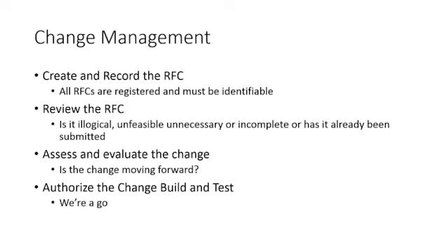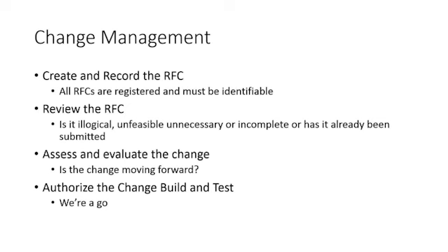So in change management, we want to create and record the request for change, the RFC. Make sure they're registered, make sure we can identify them. Because if we have to go back and say, oh, well, there it is, we created it, we recorded it, it's all about the documentation, we have to document what's going on. We can see where that change was, who asked for that change, date, time stamps, things like that. Review the RFC. Is it still logical?